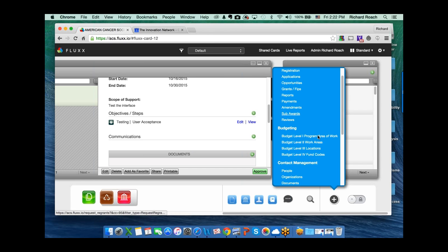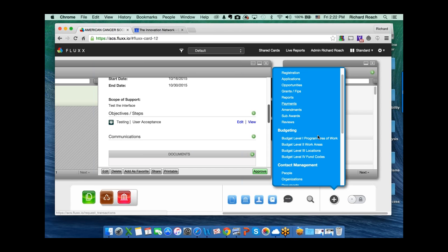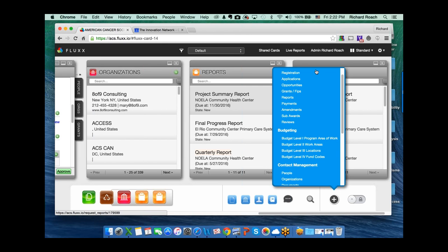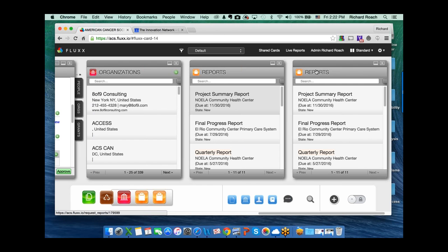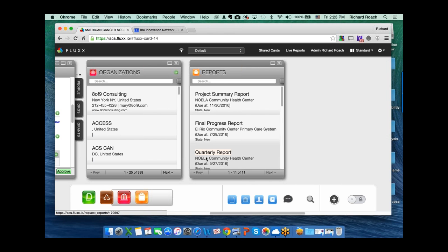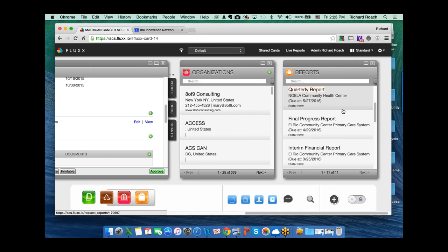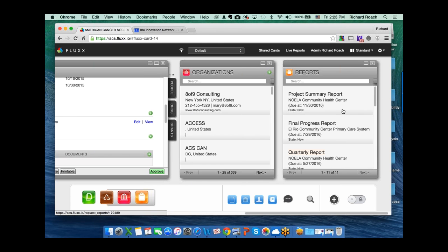There's certain information we have to get before we ultimately turn it over and get that subaward process through our iContract system. We're sort of doing it as part of our iContract system now, where we get certain preliminary requirement documentation, and then once we have it, the attorneys do their legal review, and then they send it on to the sub-grantee to execute, to sign.